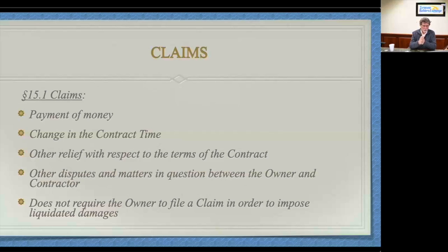One of the reasons it can be important is if you're in a context with liquidated damages. You're a sub, or you're a GC. The example I give, and the example I gave at lunch today, was you finish the job and you get a letter from the owner that says, well, you're 60 days late and that's $2,000 a day, so that's $120,000. So we're taking that off of your retainage, keeping it, goodbye. We're keeping our liquidated damages. Okay, this is not unusual. This happens, right?